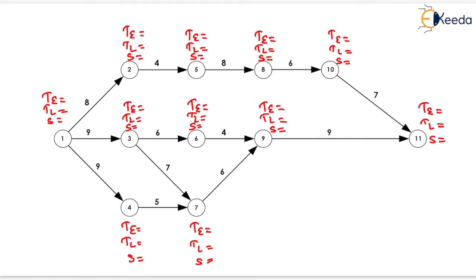For the initial event, TE equals 0. For event 2, TE = 0 + 8 = 8. For event 5, TE = 8 + 4 = 12. For event 8, TE = 12 + 8 = 20. For event 10, TE = 20 + 6 = 26.